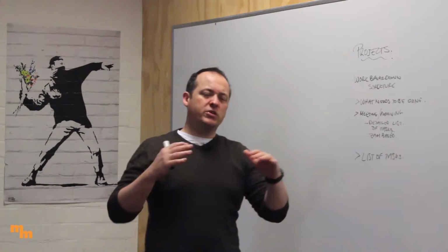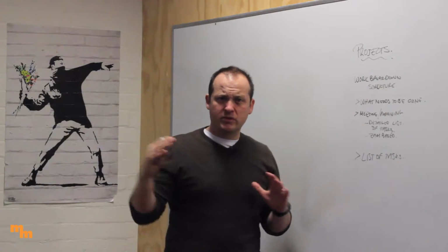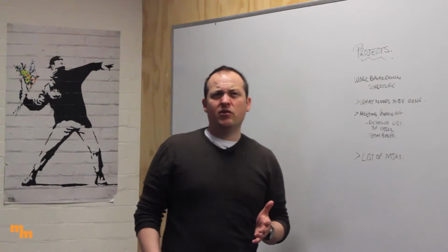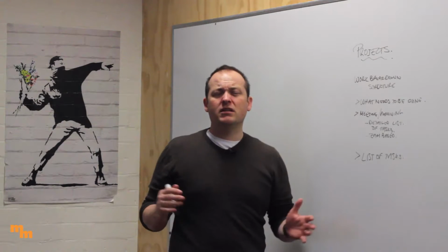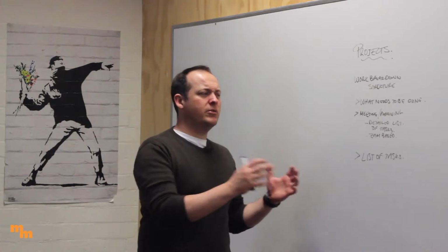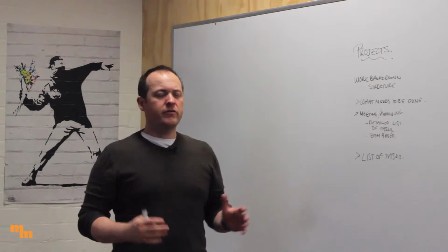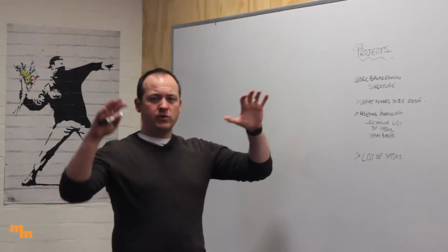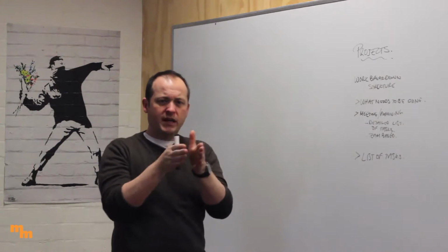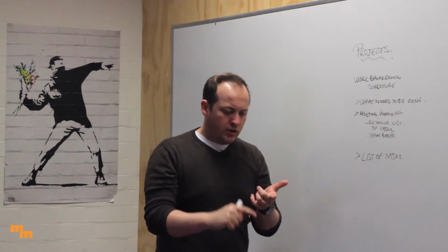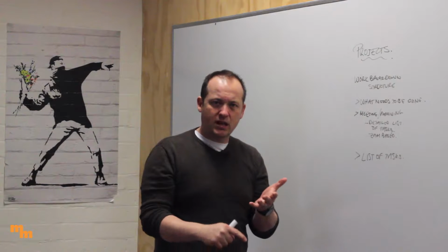All right, so what we're doing is we're just starting to think through what the big items are. Make sure we jot all those down. And then once we've finished the activity, we need to think about the cleanup. Things need to be cleaned up. We need to have someone to book people to come and do that. So we're thinking about the big picture of how it logically needs to go. Then once we've got all those big moving parts, we can break down into the smaller parts. So to book the park, someone's going to have to call the council. Someone's going to have to do this. Someone's going to have to do that.